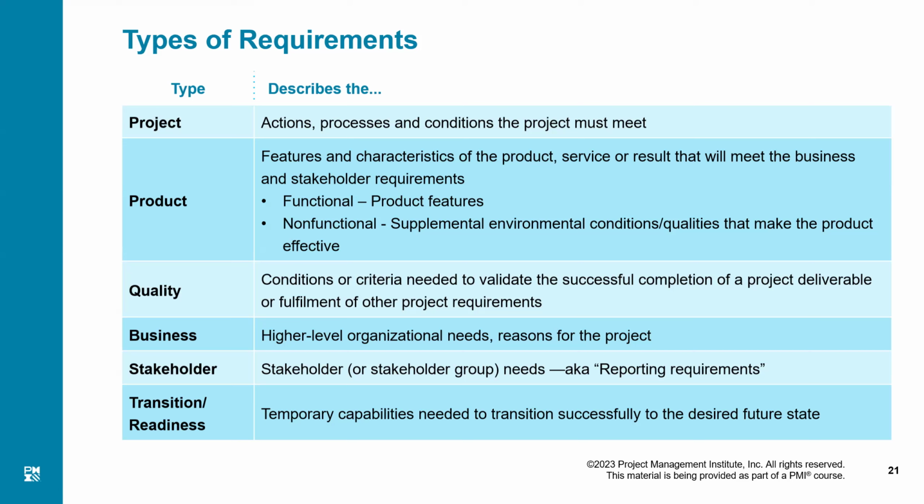And once the product requirements are established, that is the time when the scope of the product is established. And once the scope of the product is established, the next thing we need to do is to develop the scope of the project. That is where the project comes into play.